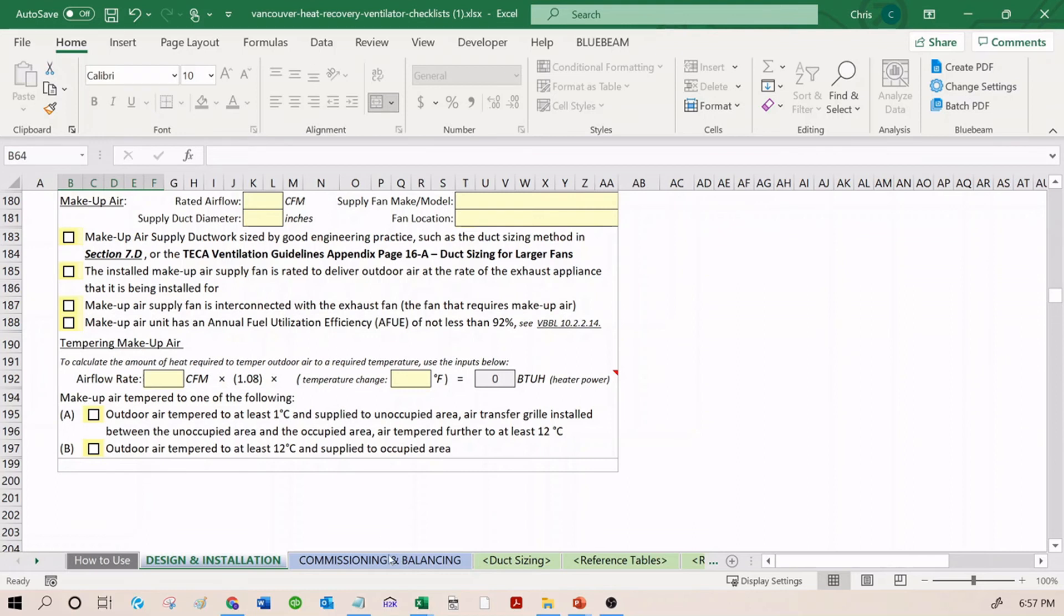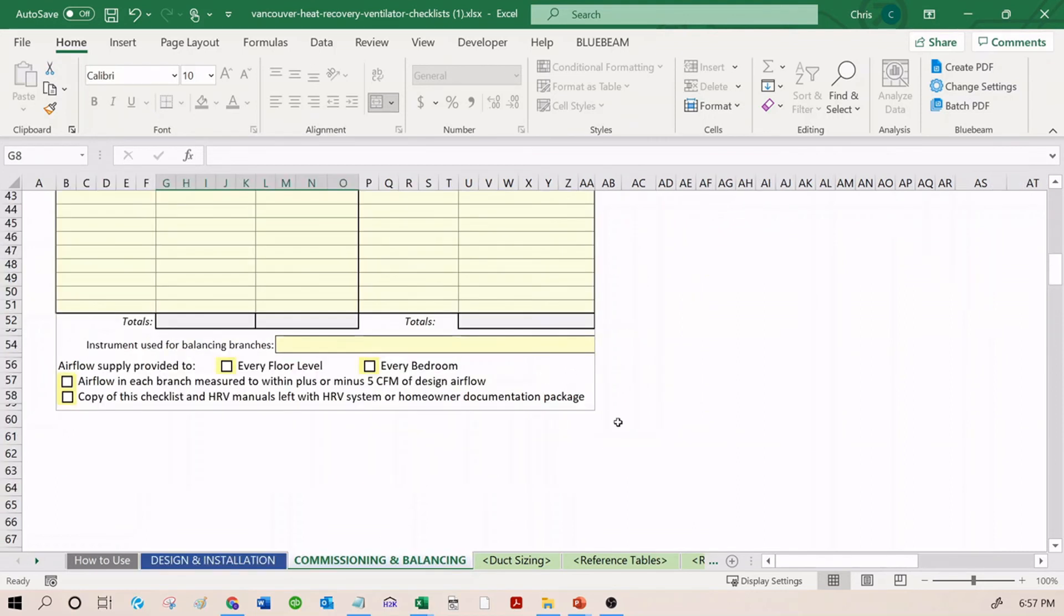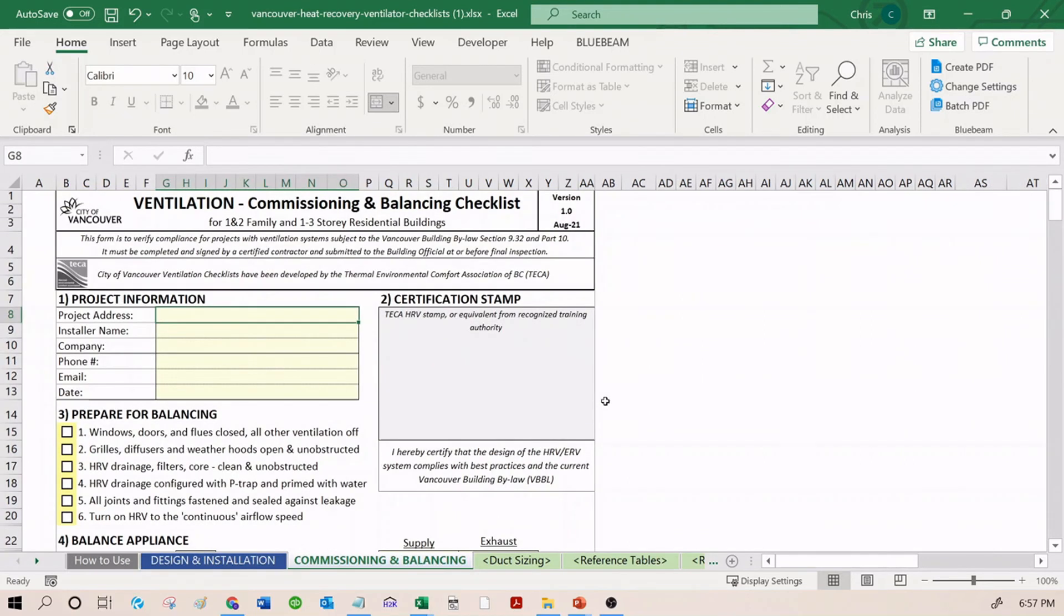Next up, the Commissioning and Balancing checklist. The City of Vancouver has adopted the commissioning and balancing procedure developed by TECA. It's a very important part of installing any HRV system that appropriate air flow is getting to and from all zones.